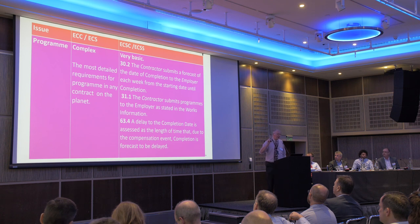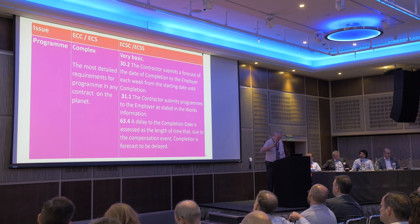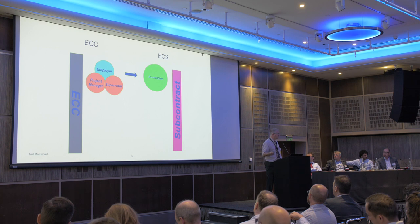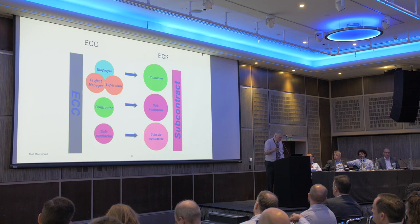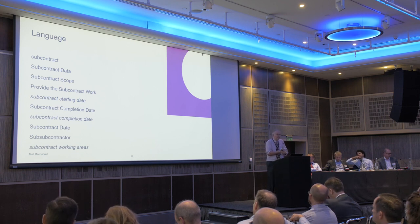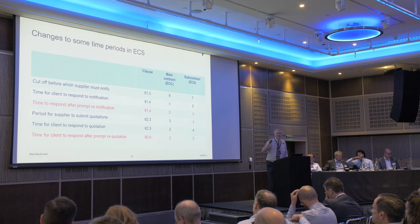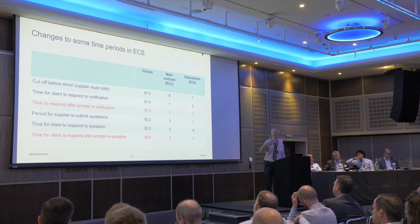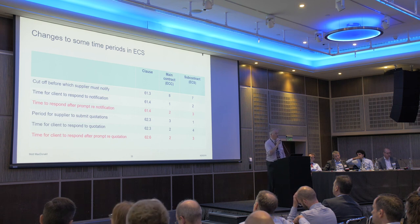Program is a big difference — massively detailed in ECC, very basic in the short contract. The ECS: language changes — employer, project manager, contractor — but you as the main contractor are God, you are project manager, supervisor, and employer for this subcontract. Fundamentally the principles of the ECS are exactly the same as the main ECC. There are changes to time periods only to make it all work together — you get an extra week when getting something from a subbie before passing it along.